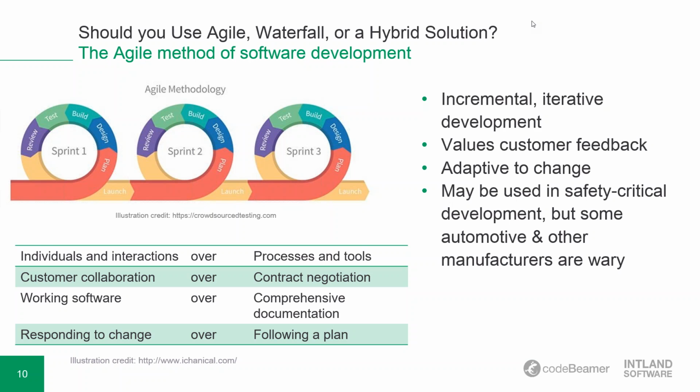As you could see on my screen, Agile was developed to provide a way to react to the changing environment and to the changing requirements faster. Essentially, it involves the use of short, iterative, incremental development stages. Between these stages, customer feedback is gathered and built into subsequent requirements. Working increments of the product are released early and often in order to give users a chance to try the product and build on the feedback as development progresses.